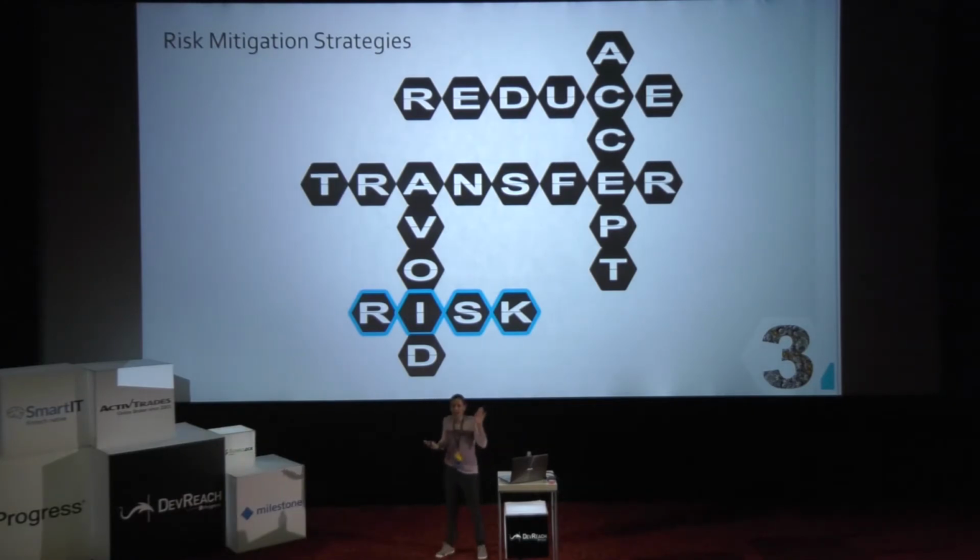And there is the last strategy to use. This one is nice, transference. So it literally means that you allocate your risk to a third party best suited to manage it. So you are handing over your risk to a third party that is willing to take care of it. Let me give you an example. The best example is customer service. Your team is an expert in making a product, but you don't have experience in 24/7 support to your customers. You would likely want to outsource that service to a professional service provider. And then you can stay and focus on your core business, and you make sure that the right people are doing the right job. Sounds good, right?